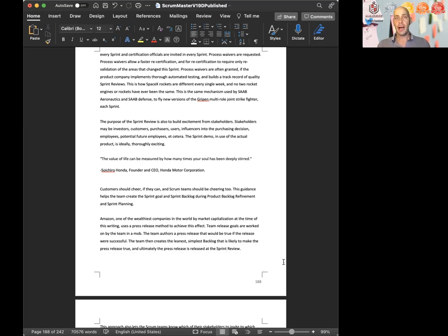If you have 1 week's worth of changes and ask for those to be certified, that might be a 1-page document, potentially, responsibly. Maybe there's boilerplate for many more pages that are required. Those might not be required if you do that 100 times in a row, over 2 years. You may then have a very fast certification path, and that is what these companies are doing. That's similar to what Tesla is doing, but I think I talked about that earlier in the book.